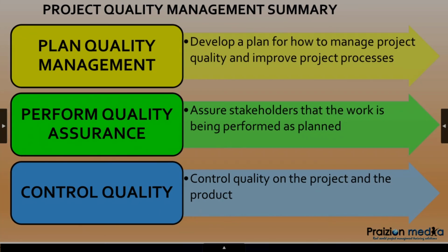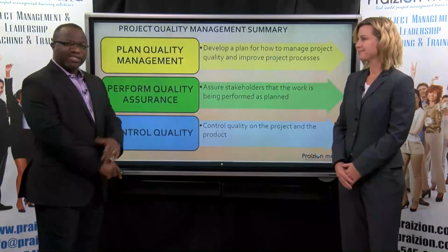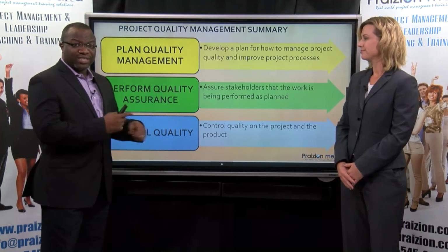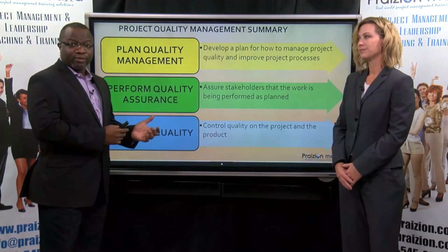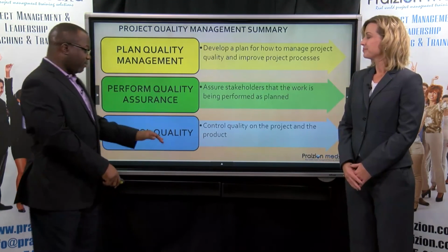Now, a bunch of other things could happen here. It could be that you got an approved change request to change something on the project. So guess what? When you get here, you make sure those changes are now inherent in the deliverable as you're inspecting it. And we get something called a verified deliverable, which is very important in this process.